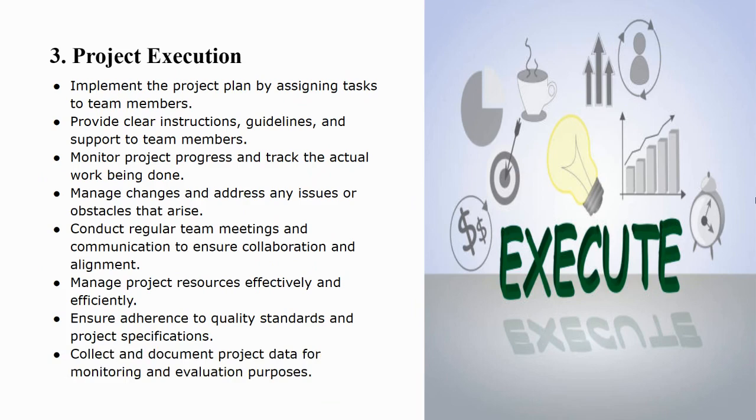We need to also collect and document project data for monitoring and evaluation purposes. Throughout your execution phase, you need to make sure you collect and document project data, project information, project reports, and ensure that you save them, you keep them for monitoring and evaluation purposes. Monitoring and evaluation will be done, and of course, monitoring is done throughout the project implementation phase, which is done regularly, while evaluation will be done periodically. For instance, it can be done at the middle, it can be done at the end of the project.